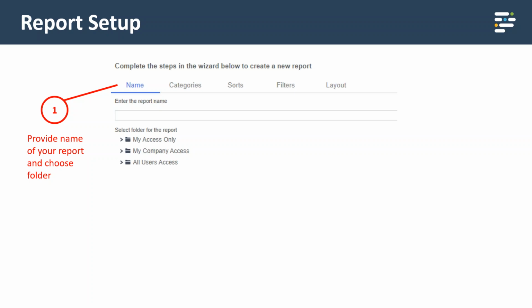And then finally, the All Access reports are for all users. So maybe I'm connected to subcontractors and architects, or maybe I'm an owner and I'm connected downstream. Doesn't really matter. If you put reports in there, then everybody would be able to see those reports. However, keep in mind, everything is still based on access. So if I have 100 different RFIs and I pull that into a report, and my contractor only has 1 RFI and he runs that same report, he would only see 1 RFI in that report. So even though these folders are about access, the access of the forms still stays as well.